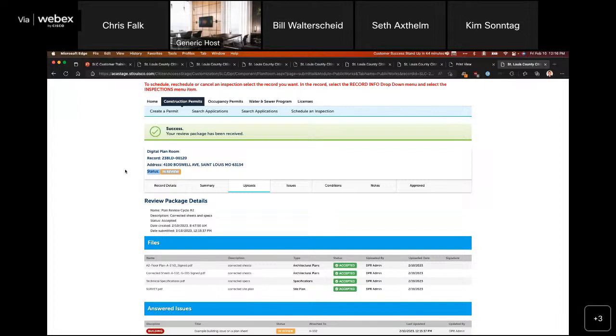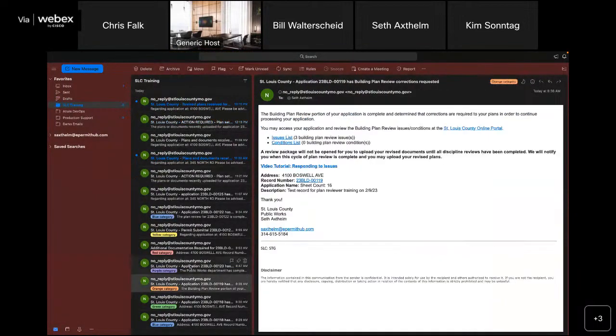So the open issues that now have answers, again, will either be marked off as accepted, meaning that everything has been addressed, and that's the end of the life cycle for that specific issue. If they find that the issue is not addressed, they will provide further comments on that existing issue. They'll mark it off as such that it was not accepted. And then when they complete their review, you'll get another email just like what we had earlier, where it might say the building plan review portion is complete. And any issues that they did not accept will flip back to a status of open.